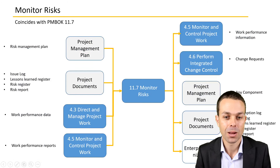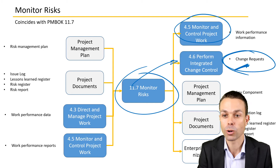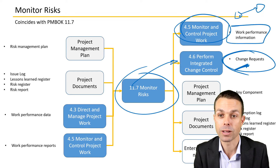Monitoring risks can feed into perform integrated change control because we might need to make a change to one of our baseline documents. And of course, monitor and control project work, because we're looking at project information to see how our project is tracking — what we had planned versus what's actually happening. Project documents and project management plan are also a key output of monitoring risks.